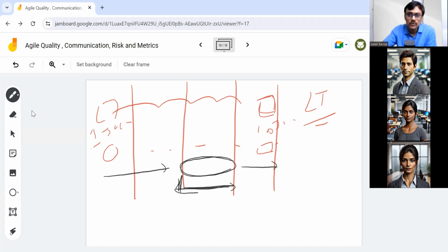We can say we fix a ticket in every 2 hours. So we took 2 hours only to fix that particular thing. But overall, it took 10 days. So that's another problem. But for development time during those 10 days, our boundary was this much only. So sometimes a sub-unit also maintains that time, and that is called cycle time. So cycle time can be defined as a starting boundary and an ending boundary. You can define any start and end boundary in the whole cycle and say this much time I want to track.